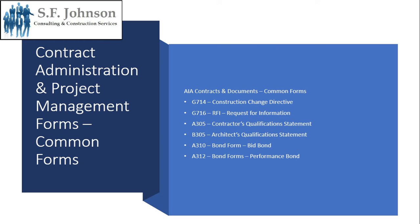More common forms: A305 is the contractor's qualification statement, which may need to be submitted when working on state projects or projects for very large companies. B305 is the architect's qualification statement, for the same reason. A310 covers bond forms for bid bonds, and A312 covers bond forms for performance bonds.